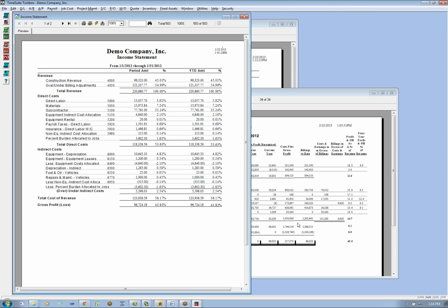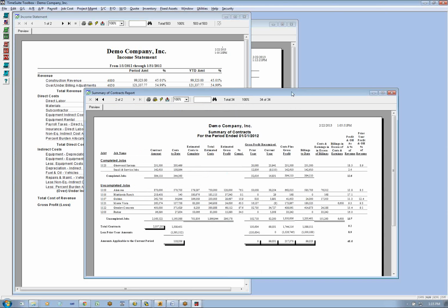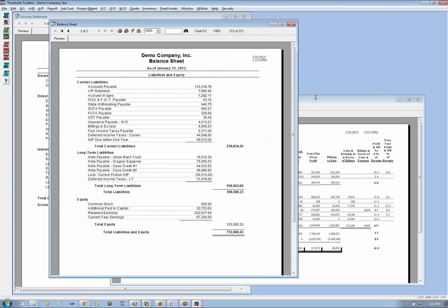Your indirect costs are proven if you tie into your summary contracts, because your summary of contract, your direct cost, includes an indirect cost allocation, and your indirect cost allocations show up at the bottom of your income statement in the indirect cost section. So your over-under allocation of indirect costs is always known, and we cover that in depth in the cost control webinar. So if you're not familiar with these concepts, go do that webinar. I think it's really good for concepts, lots of concepts.